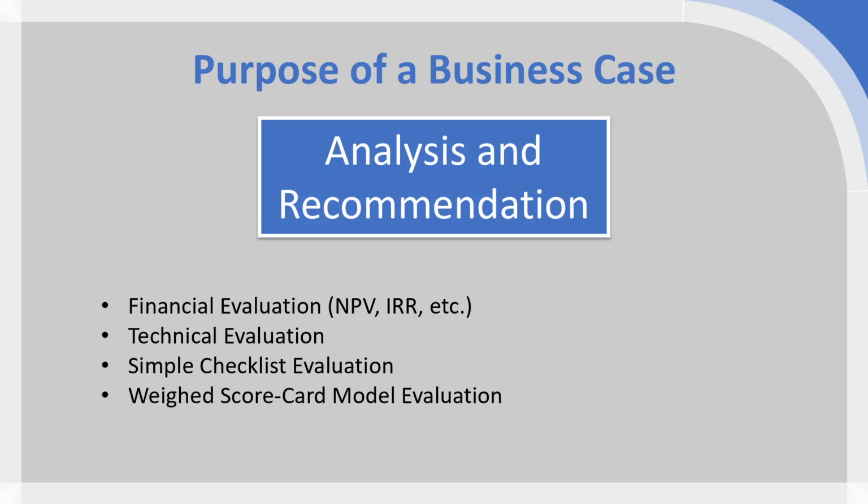If it's not a project which lends itself to easy financial quantification, you can have technical evaluation. It will save X amount of time. It will make people's jobs X amount easier. So you can have a technical evaluation of the technical merits as well. A simple checklist evaluation model could be used. So this is just creating a list of requirements from your stakeholders, so from your users typically, and then saying, well, the project actually meets each of these requirements. So each of these individual requirements from the users will be achieved. So therefore, this is why we're recommending this project.